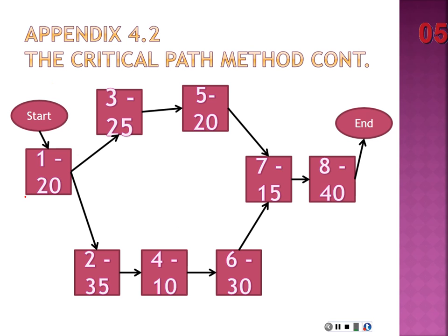If I would just draw on here, RT diagram. One of the mistakes I saw someone make is that they started on day 1, and you start on day 0, okay? And we're going to say this is in hours. So if task 1 takes 20 hours to complete, right, then my earliest start time is 0, right, and my earliest finish time is day 20, okay?